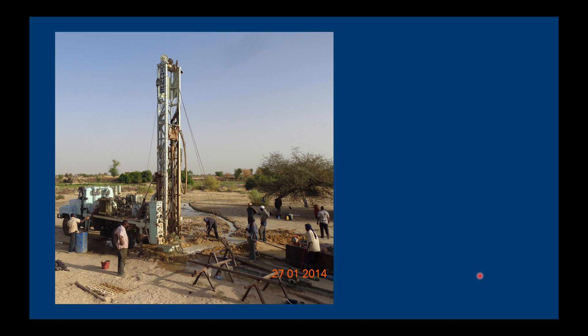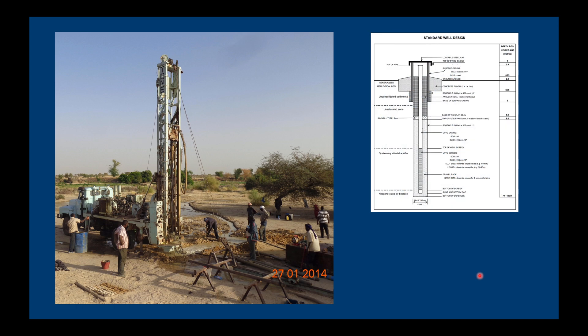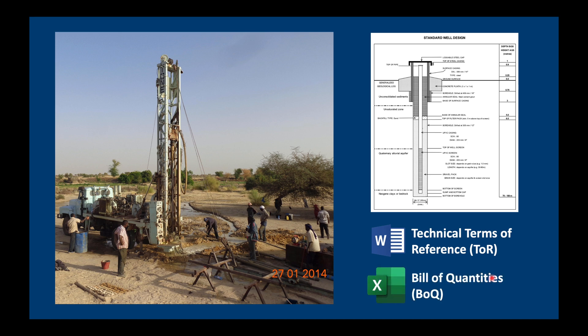To summarize: we need to have a very clear idea of what we want to achieve. Then we need to make a design — even if quite rough — of how deep our well is going to be and what materials are needed. We write all this up in the technical terms of reference. And finally, everything needs to be listed in the bill of quantities — all the materials, everything that needs to be paid, should be in the bill of quantities.